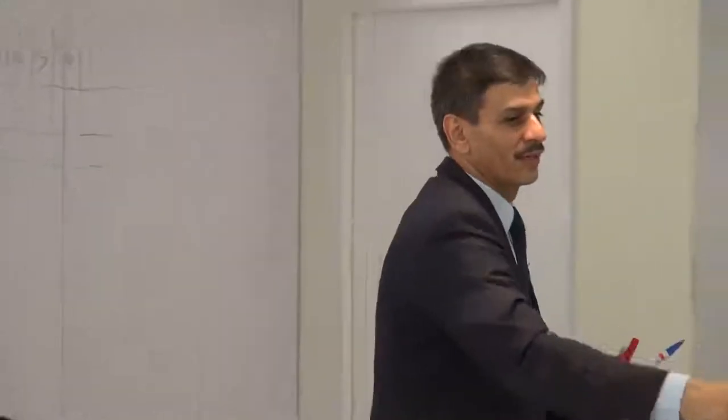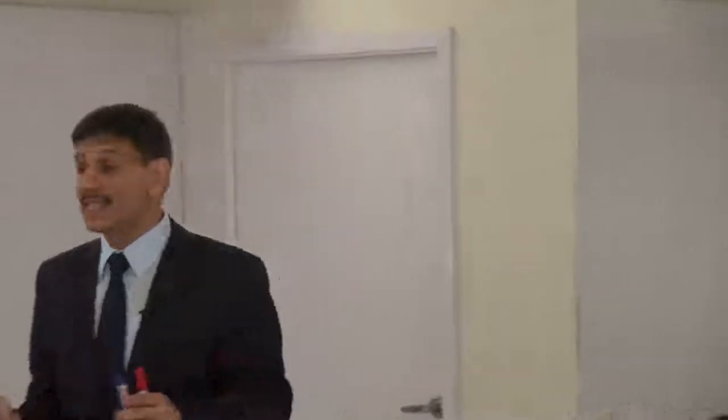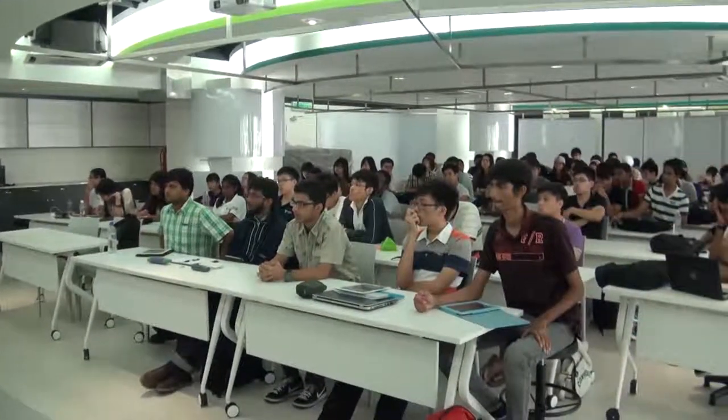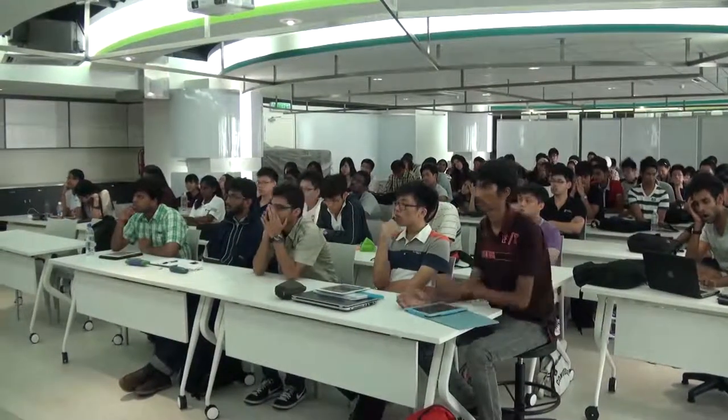So many words, okay. It started on week 4 and finished on week 6. It started in week 4 and finished on week 6. Is that all I can tell from this? Okay, sorry, yeah. Basically, it started on week 4, but it was planned to week at week 7, but it finished off at week 6. Okay, exactly. So this task somehow was planned to finish on week 7, but we managed to finish it 1 week earlier. So this is how I read it. Don't go and rub this.